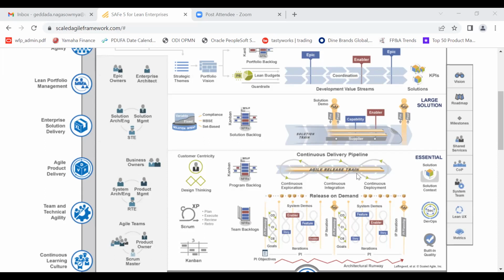Being a product owner, what you have to do is sync with the product manager and see what your priorities are, and these priorities have to be delivered within the given time. Once you have identified these features, you come and sit in your place and start writing the user stories and place them in the team backlog. So the team backlog consists of user stories. These user stories are maintained in the team backlog, and they are prioritized for each sprint.